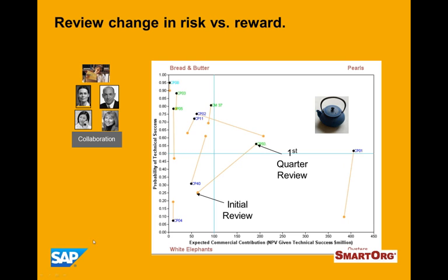But if you look over here at this project down here, CP04 it's called, it has declined in technical success, and it's still not worth a lot of money. And these are the kind of projects where you want to say, okay, if we can't really do anything with this project to make it a much better project, let's kill it and free resources to put against projects that can make us a lot of money.